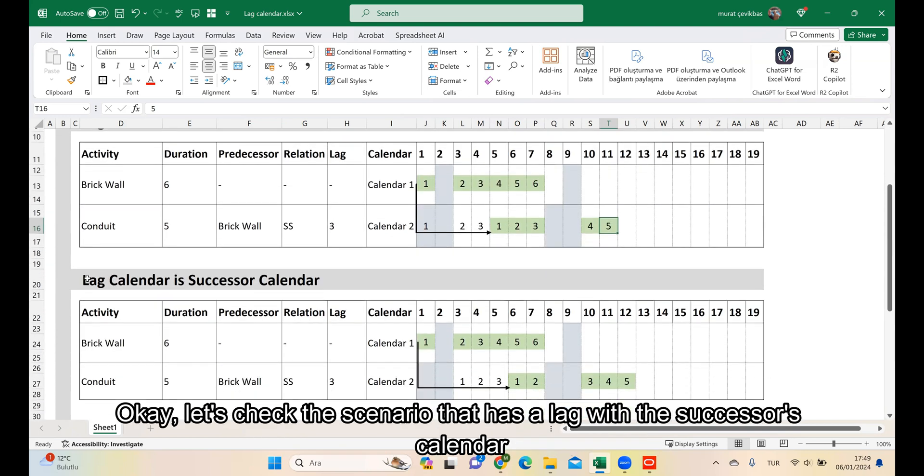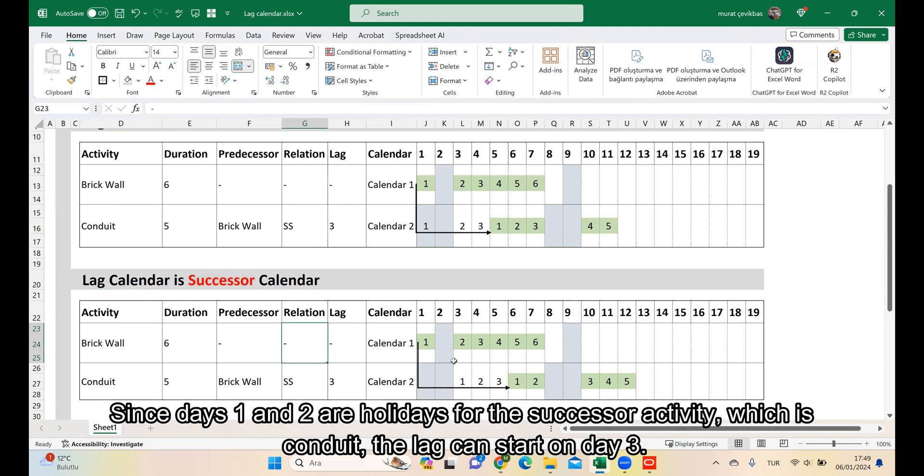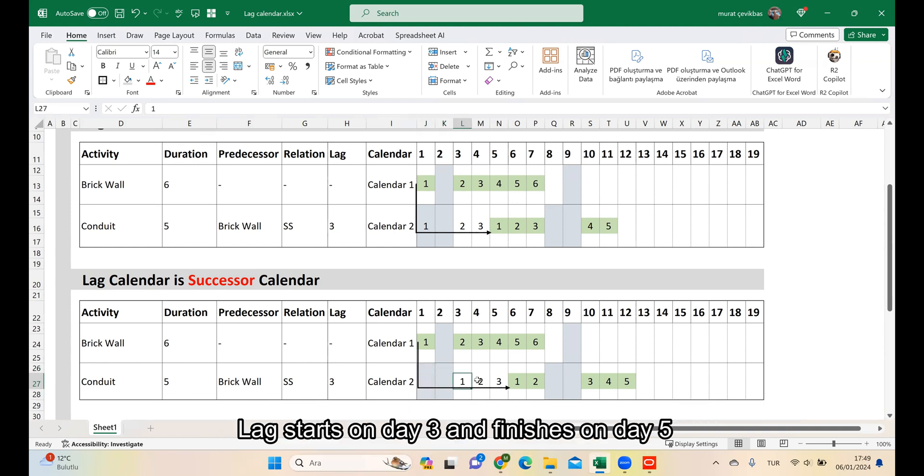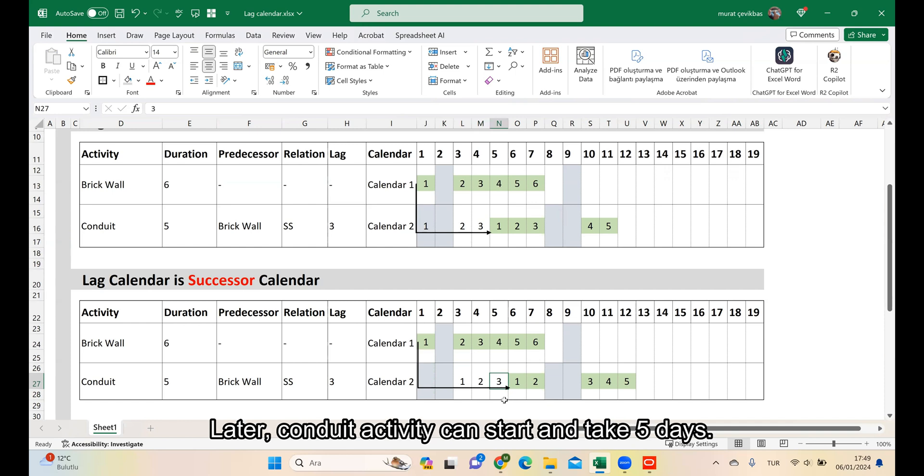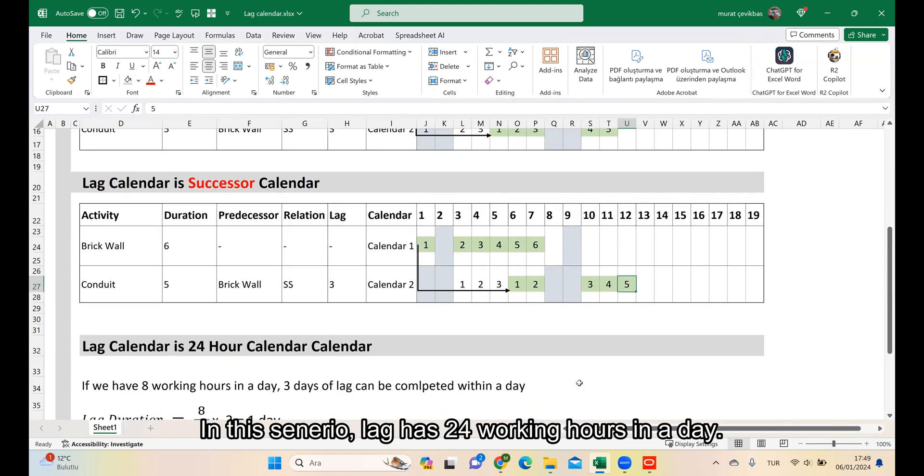Let's check the scenario where the lag has the Successor's calendar. Since days 1 and 2 are holidays for the Successor activity which is Conduit, the lag can start on day 3. The lag starts on day 3 and finishes on day 5. Later, Conduit activity can start and take 5 days.